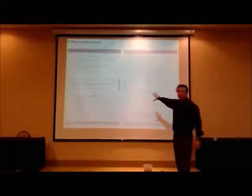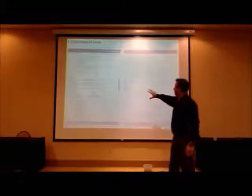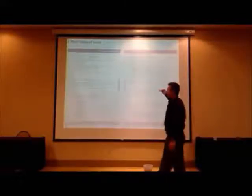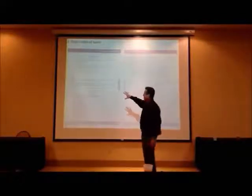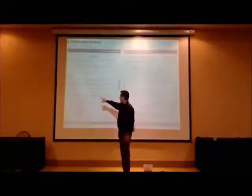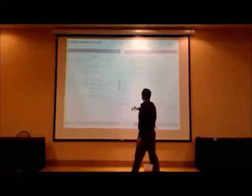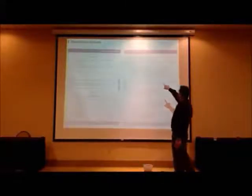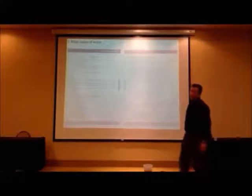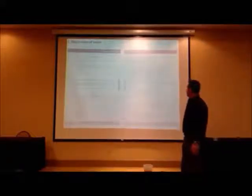Now this is what Fortune Builders' scope of work looks like. Mine is very similar. And it goes over everything in extreme detail. The exterior, fix damaged fascia board at front of house above garage door, paint any damaged wood, install new exterior lighting, and it just goes boom, boom, boom. Up here, the paint colors. Every paint color and the code, where they're to get it, and the finish, black, high gloss, or semi-gloss, satin, whatever the case might be.